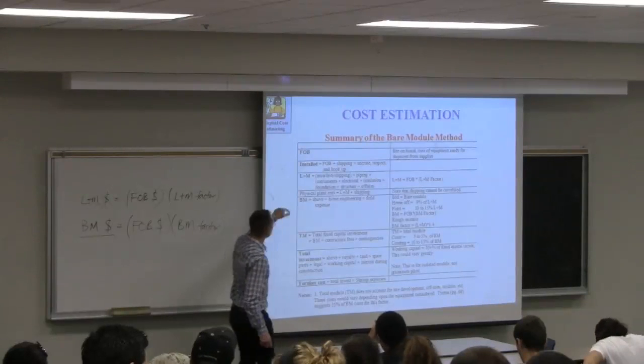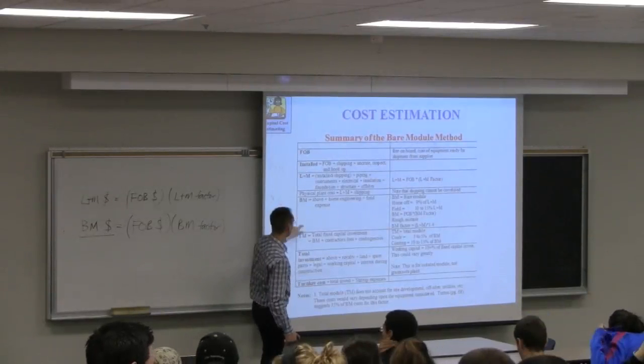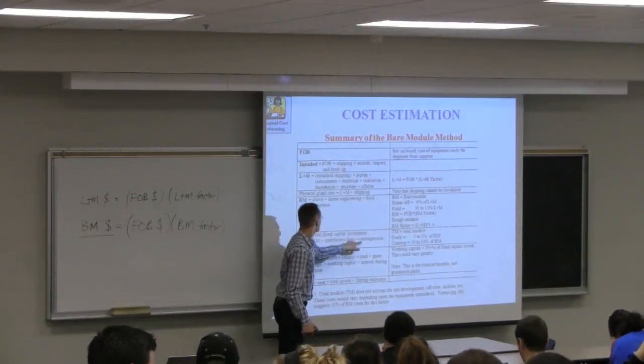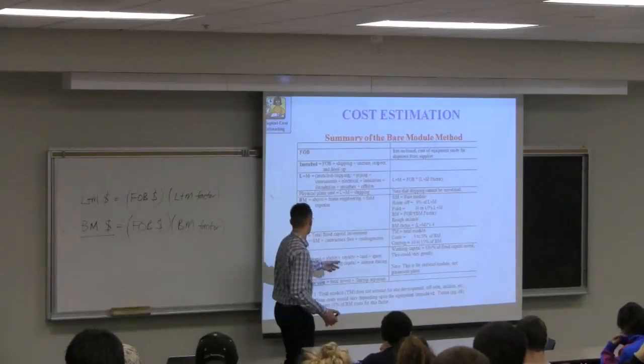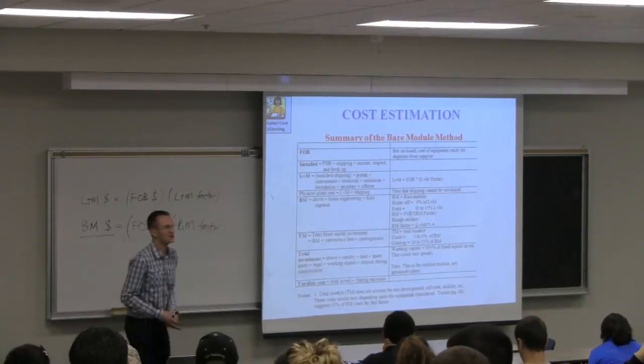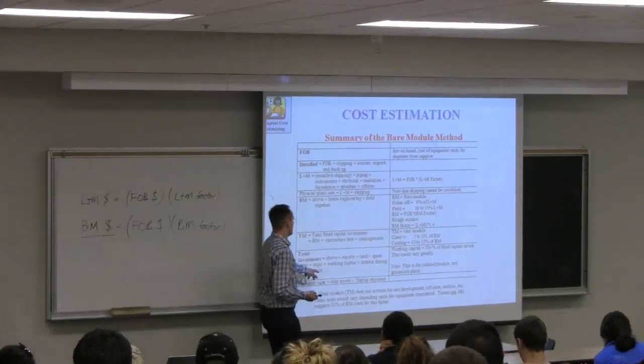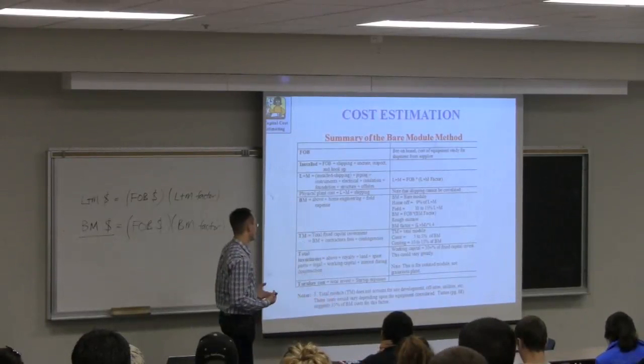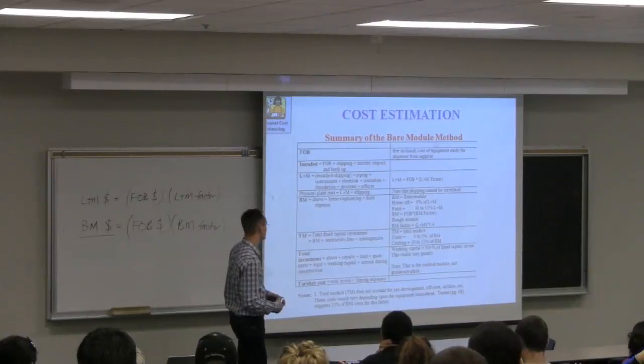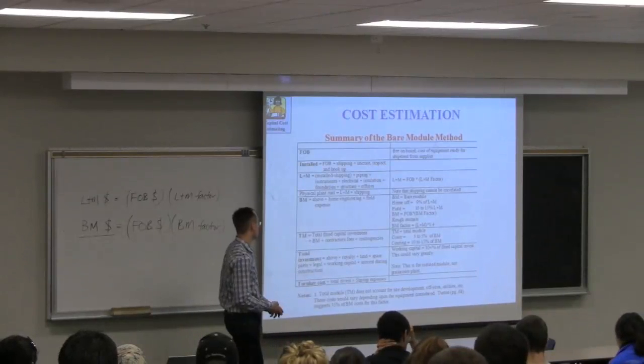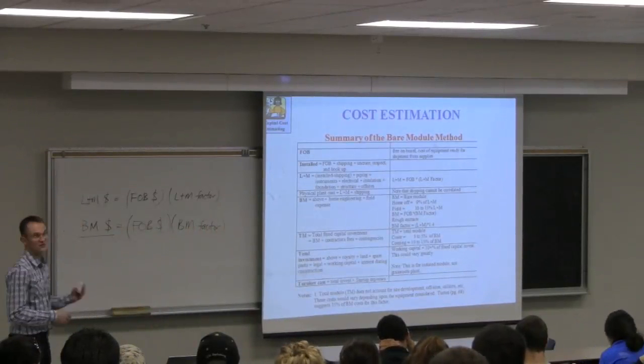So we've got our FOB costs that we get from the quotations from the vendor, our labor and material costs, our bare module costs. We add in, once we have our bare module costs, the contractor fees and contingencies to get our total fixed capital investments. Then we still have additional costs we have to incur, we have to buy the land, legal expenses, accountants and other labor and overheads. This really is a bit harder to estimate. It's a very crude estimate here. You would have a better sense of this if you actually were working in a company. So we don't try to focus on this too much because it can be quite specific to the case you're doing. And then you get your total investment cost. This is your total capital expense that you then report in your cash flows that we've been doing up to now.